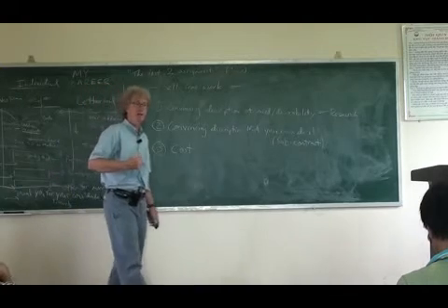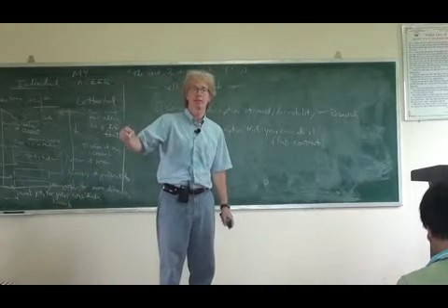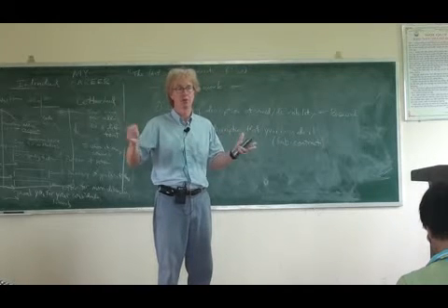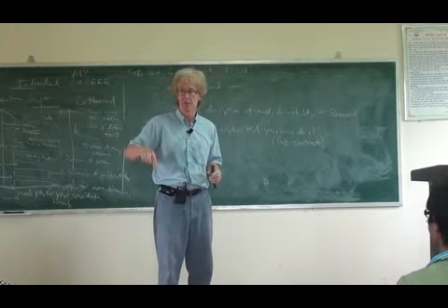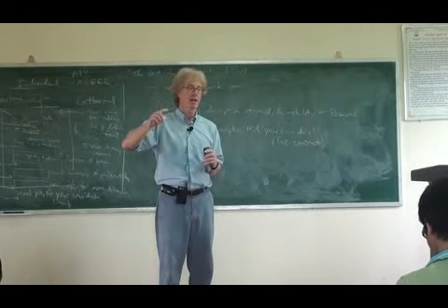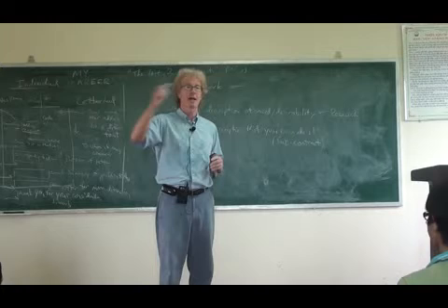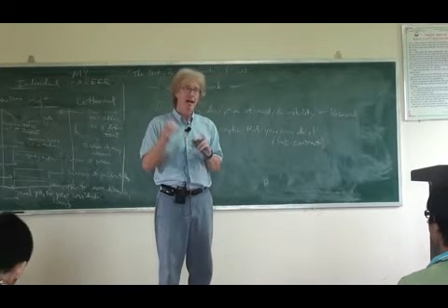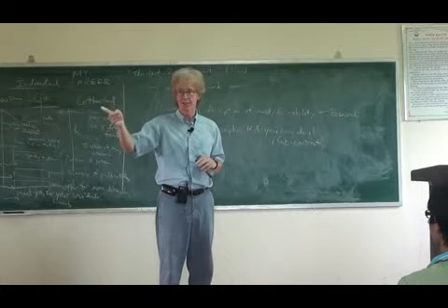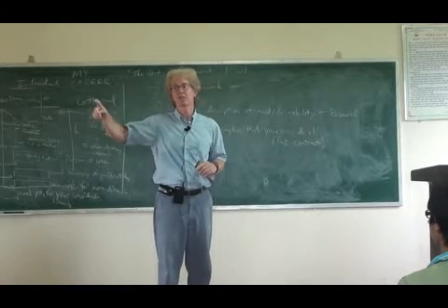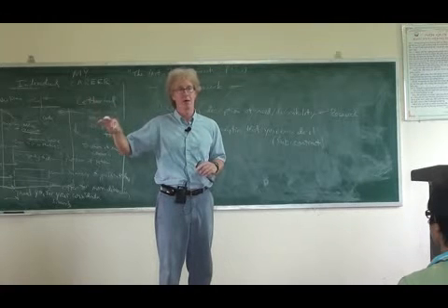So in my career, I've done a lot of international contracting, where somebody in another country outside of the U.S. hires me to do something, including, for instance, me being here, right? So when I agree on the price, I have to take into account that travel to that other country is expensive for me. But there's also other hidden costs. I have a house back in the United States. I'm gone for 2 months, right? I have expenses associated with that house that I have to pay while I'm gone.